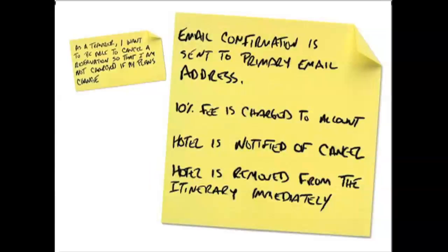Because otherwise, one could fairly say a user story doesn't provide enough information. That information starts surfacing for us at the acceptance criteria level. Then directly built off of the acceptance criteria are the detailed tasks, or as some people call them, engineering tasks. And those engineering tasks end up being what the team builds against. Yeah, and you can see how each of these pieces of acceptance criteria then breaks down into the tasks. So that's great.